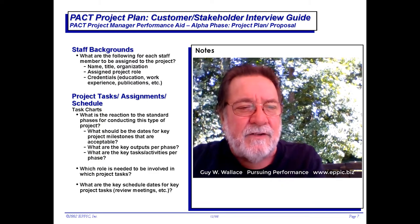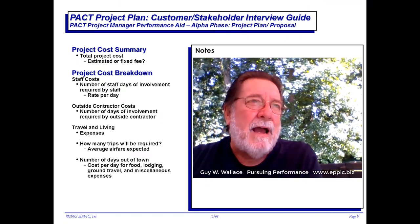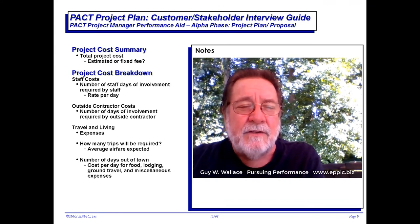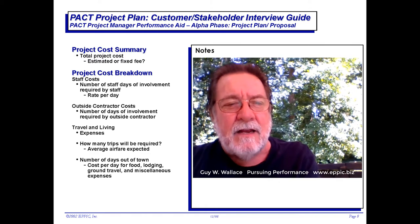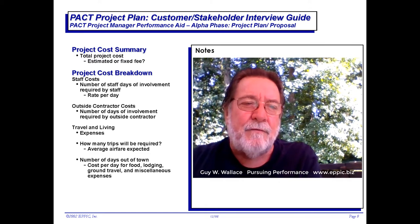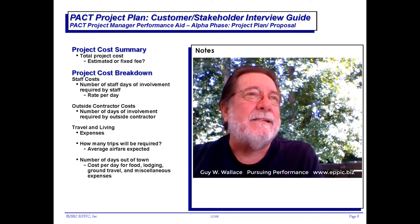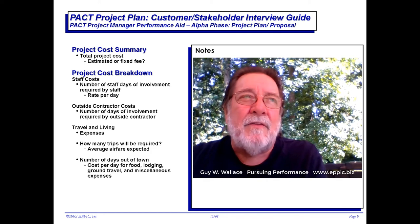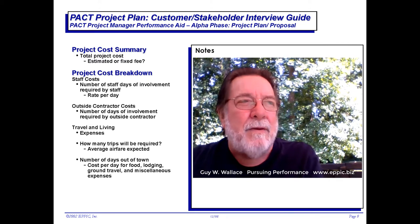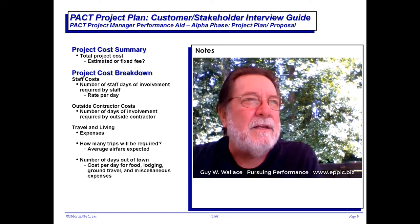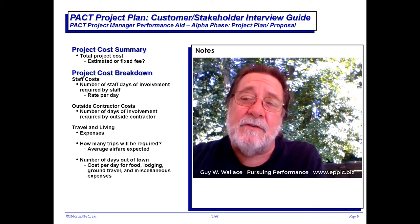We need to understand both the customer side and the supplier side so we can move forward. We need to be able to summarize what this project is going to cost. In my approach, I try to do everything fixed fee as a consultant, but sometimes the project is too fuzzy and I can't be predictive enough to put a fixed fee on things, so I may have to go with estimated time and expense. In some organizations it's called 'blue money' — you're on the payroll as a support organization and there's no charge-back to the requester.